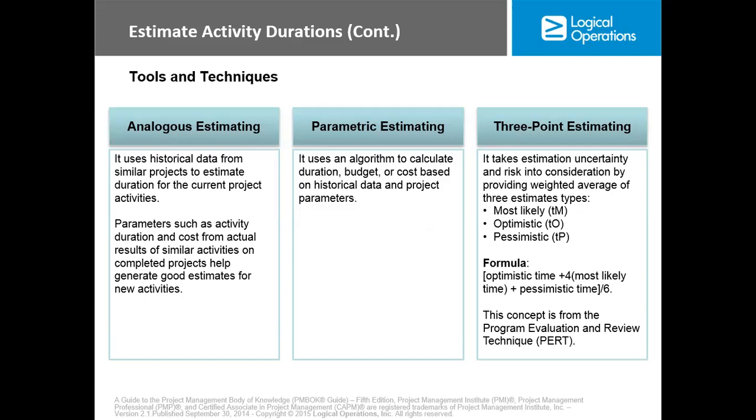For instance, if you are a builder, a developer, you build houses. Say you built a 5-bedroom duplex for somebody, and you want to do similar work, a 5-bedroom duplex for another person. You just give the person an estimate based on the data from the previous house that you built. Normally, it is more of a 50-50 thing because market conditions and other factors may lead to your data being wrong for the new project.